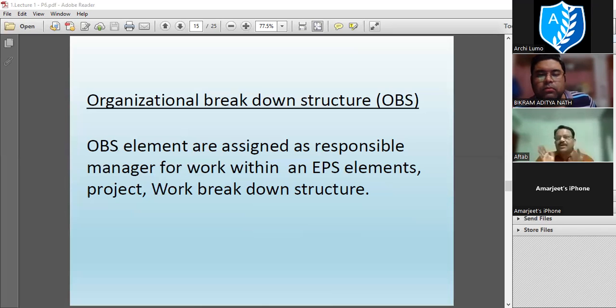First of all, while laying foundation, in any project you are going for site clearing and leveling. This is the very first item in any project, whether it is civil or structural or whatever it may be, because no site is leveled 100%.